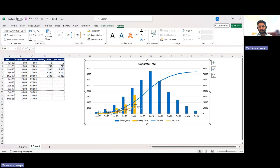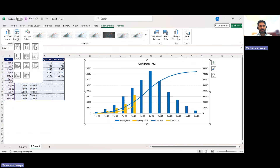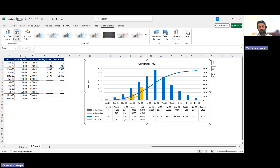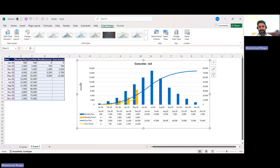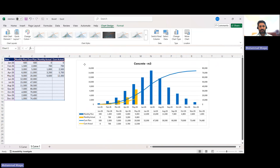The better approach is to go to Chart Design, then Quick Layout, and select a layout that includes a data table below the chart. Now I can read, for example, that in May my monthly actual is 6,600 and cumulative actual is 12,300 against a cumulative plan of 20,000 — I can see I am well behind. The graph stays visually clean while the table provides the detail.